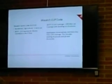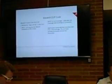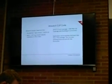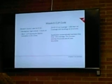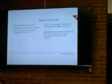I've alluded to code 160703, residential agricultural 5-acre lot, 4814 COP required for electric substation in RA5 zone. The question of 20% max lot coverage with buildings or structures, we really looked at this and came in at less than 15% of total coverage with structures.